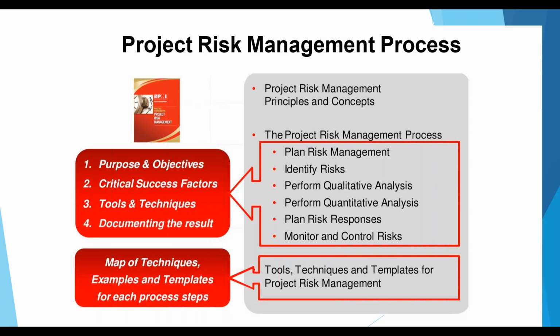So this is one of the important elements, which is called risk treatment. And the last one is to monitor and control the risk, which means you need to implement review changes in project risk exposure, identify additional risk management actions as required, and if need be, assess the effectiveness of the project risk management process.